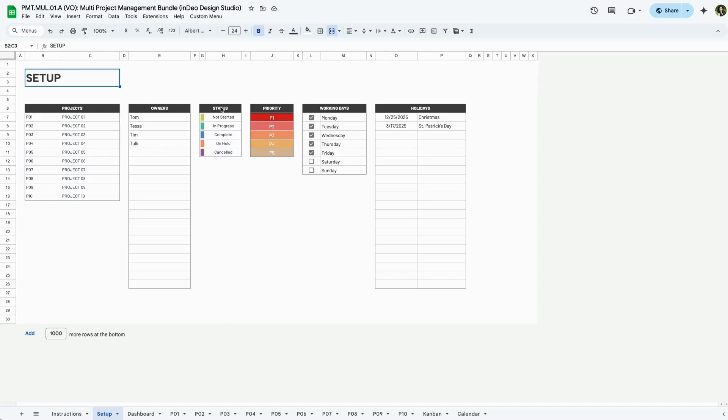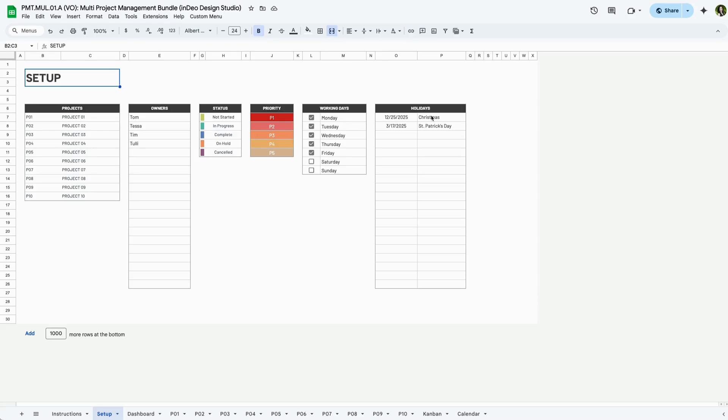You can define your task status by changing these names or leaving them as they are. You can also define your priorities and you can change the labels, but the colors themselves do not change. Here, you can select your working days. Unchecked days will be excluded from timeline calculations.